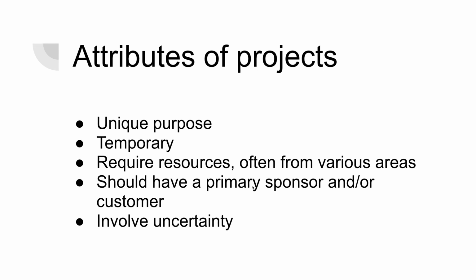Okay, so from my personal experience, I know sometimes the uncertainty comes from the customer side as well. The customer would say, okay, I will make this happen. It doesn't matter how much it costs. You do your work. Let's see how it goes. But in the middle of the project, while it was going on, the customer said, "Hey guys, sorry, we don't have enough funds. We have to stop this project." So uncertainty is everywhere. Okay, so we might not be profitable at the beginning. So then we are going with a loss.